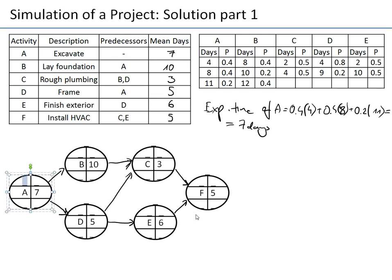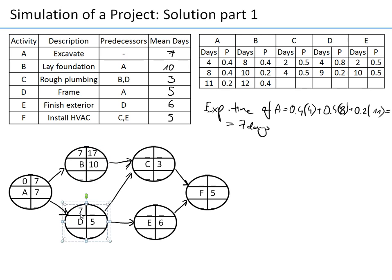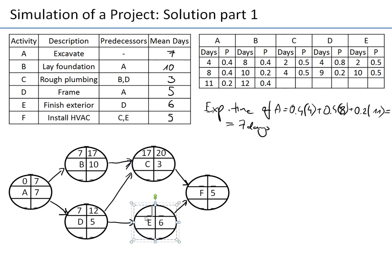We have one starting activity and one finishing activity, so no dummy activities are needed. We start at zero; activity A finishes at day seven. Activity B can start on day seven and, taking 10 days, finishes on day 17. Activity D starts day seven and finishes day 12. Activity C can start no earlier than day 17 — the maximum of 17 and 12 — and finishes on day 20. Activity E finishes on day 18, so activity F starts on day 20 and finishes on day 25.